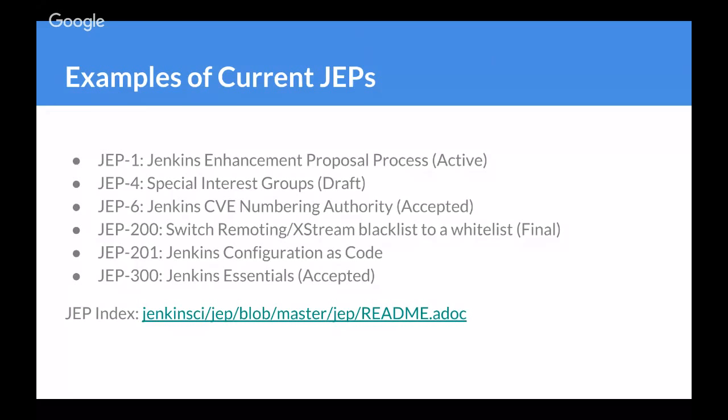If someone wanted to create another JEP to say we should fix all of the plugins, for example, that would be another scope. We would create another JEP that said, here's the scope of that work, and that JEP might never become final, or it might say, we're going to fix the next 50% and scope your work to that, and then when that scope was done, you would mark it as final.